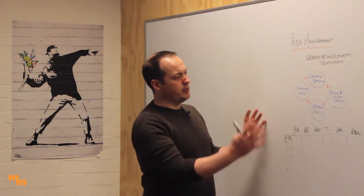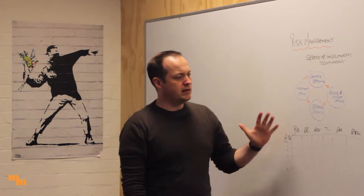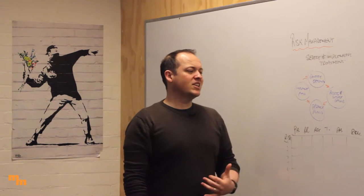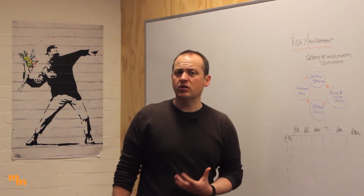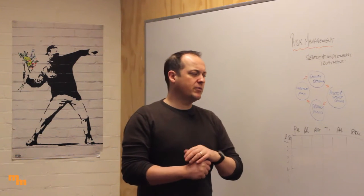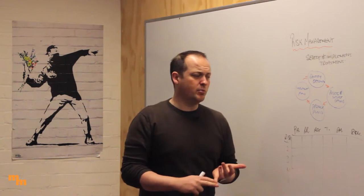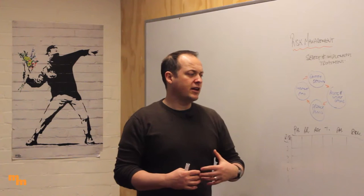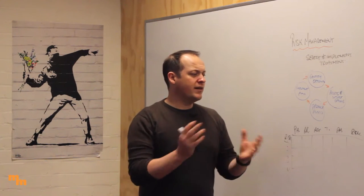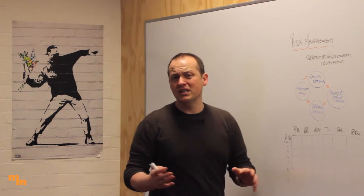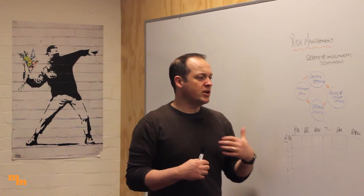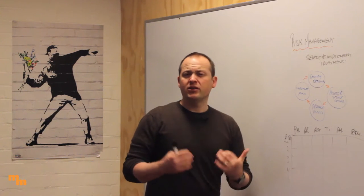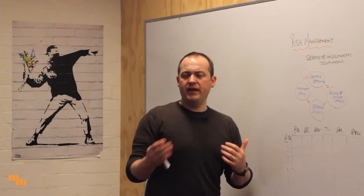Before you can implement it, you need to think about how you're going to communicate this plan. You've identified all your risks, you know what you're going to do about them, you know the consequence and likelihood — but how does everybody know that? You need to make sure everyone in your organization knows about it. The purpose of communicating is to ensure people who are responsible for implementing the plan know their responsibilities, what they're supposed to be doing, who they answer to, and who to report problems to.